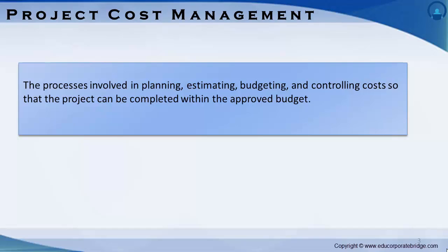For example, limiting the number of design reviews can reduce the cost of the project, but could do so by increasing the customer's operating costs. The cost management planning effort occurs early in project planning and it sets the framework for each of the cost management processes so that performance of the processes will be efficient and coordinated.